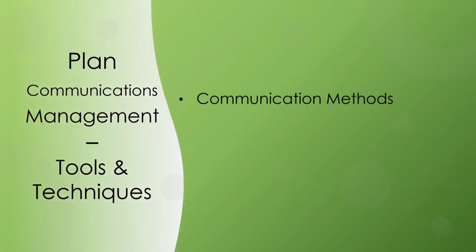Communication methods. There are several communication methods that are used to share information among project stakeholders. These methods are broadly classified as follows: Interactive communication, between two or more parties performing a multidirectional exchange of information in real time. It employs communications artifacts such as meetings, phone calls, instant messaging, some forms of social media, and video conferencing.